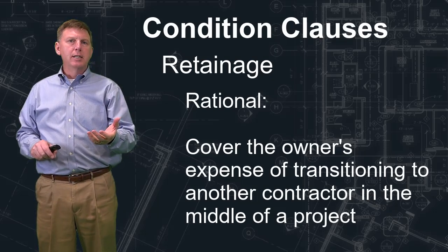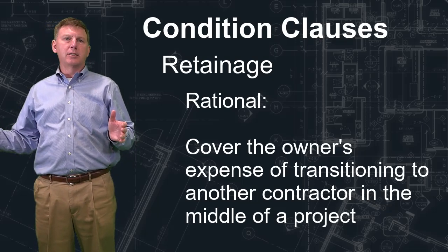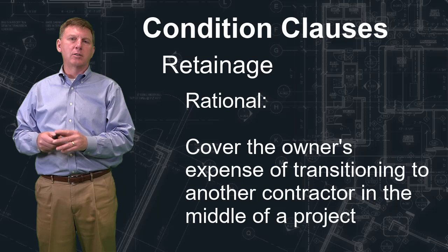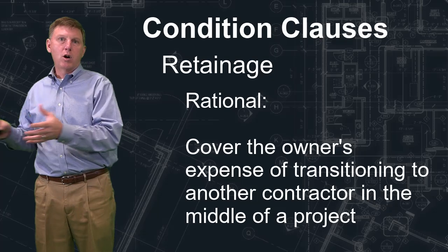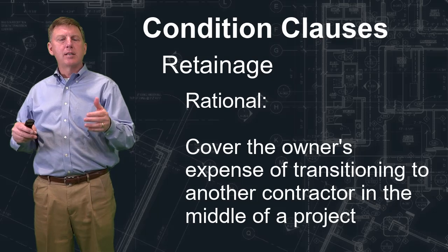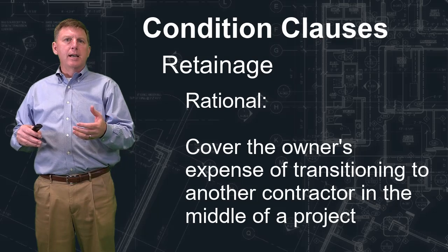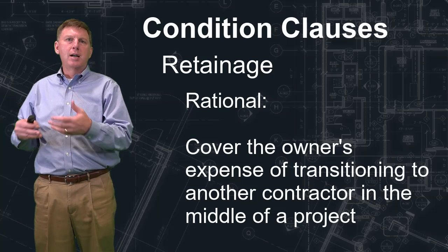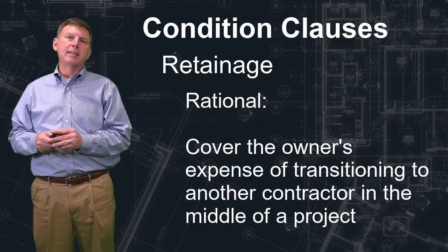That's retainage. And that happens throughout the entire project life cycle up until you get substantially complete, where the owner starts to release some of that retainage back to you, if everything is done correctly. It's the idea that the owner, should a contractor walk off on a job or go bankrupt or something like that, will have an expense to hire new contractors. So that transition period is going to cost them something. And that retainage can pay for that. But if you finish the job and you finish it on time and on budget just like you were supposed to, then the retainage is yours and the owner will release that retainage back to you.